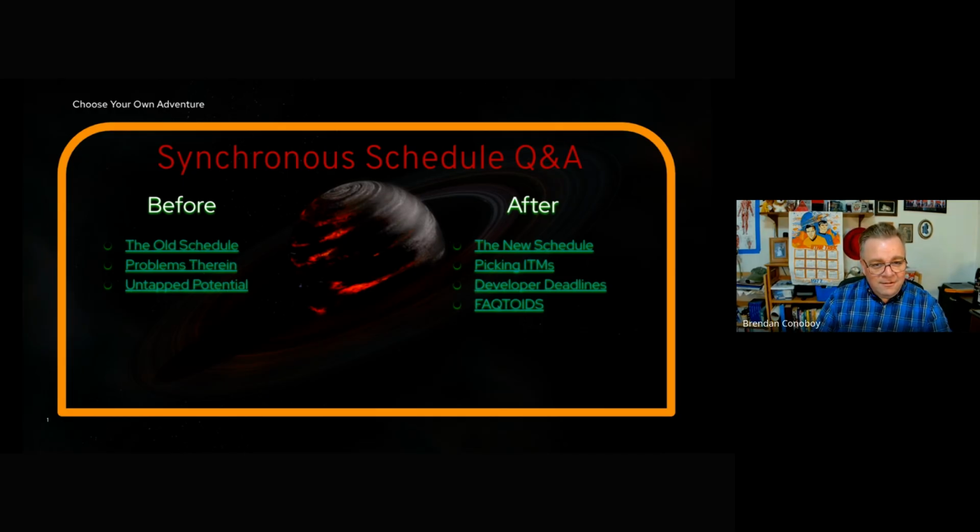Going back in time, in 2019, Brian, you read those backwards, that's crazy. Okay, going back to 2019, Red Hat made a major change in the way that we were doing releases. Prior to then, our schedule was very dynamic in the worst possible way, which is to say that we never knew when the next release was going to come out. We had to look at all of our partner launch schedules and pick the date that seemed to be the sweet spot. And in 2019 at Red Hat Summit, when we launched RHEL 8, we announced that we were going to move to a new schedule where it was just a clockwork schedule. Every 6 months, we were going to make a new release.